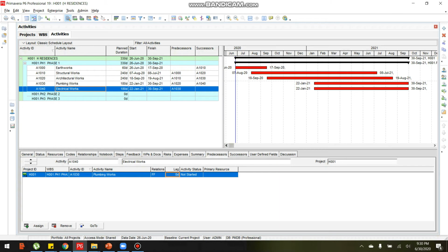Don't need to use the tool schedule frequently. It's much better you prepare the schedule first with the assigned relationship and lag, then input it in an Excel file. From the Excel file we will import the file to the Primavera program.